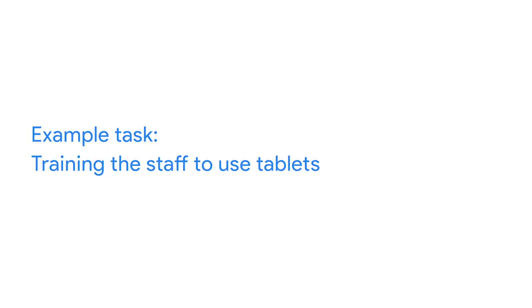When determining estimates using this technique, you'll need to ask your task experts questions or conduct research that will help you understand best and worst case scenarios. Then, add these notes to the plan for each task. Let's try out 3-point estimating with an example from the Sauce and Spoon project, the task of training the staff to use the tablets. You ask the person tasked with arranging the staff training to give you a time estimate in each category, and to describe the conditions for each.